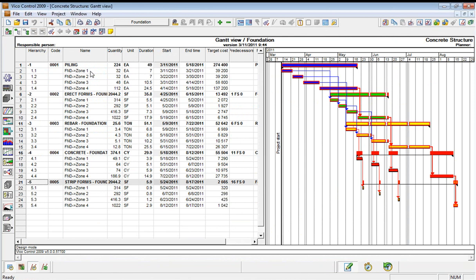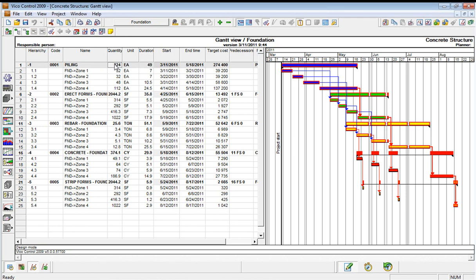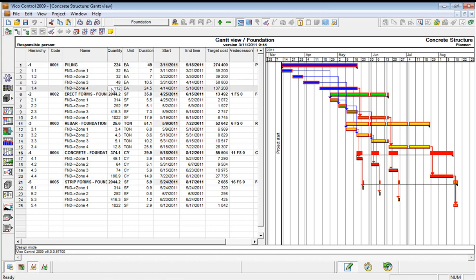So instantly we have zone 1 through 4. Instead of having 224 piles with just a duration of 49 days, we've now split it so that we've got the number of piles per location, and the duration is based on that more accurate quantity. We have defined locations and can get more accurate quantity data by location.